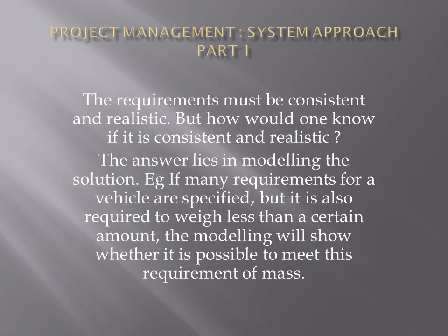But how would one know if it is consistent and realistic? The answer lies in modeling the solution. Example, if many requirements for a vehicle are specified, but it is also required to weigh less than a certain amount, the modeling will show whether it is possible to meet this requirement of mass.